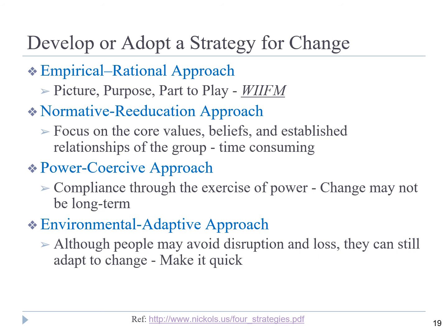So to make that change, we had to change the values and the norms in those organizations. So we formed an advisory group from the executives from those courts, essentially the clerk of the court, who's the chief operating officer of the court. We formed an advisory group to look at technologies for various business activities and identify the best technology as they collectively see the merits of those.